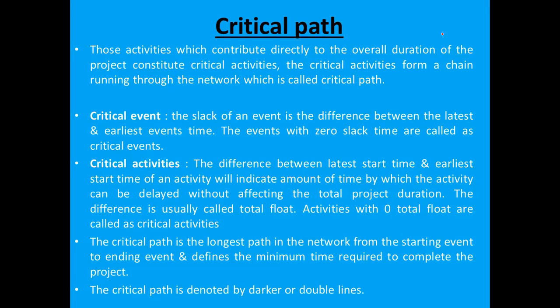Then what are critical activities? The difference between the latest start time and earliest start time of an activity will indicate the amount of time by which the activity can be delayed without affecting the total project duration. The difference is usually called the total float. Activities with zero total float are called critical activities.